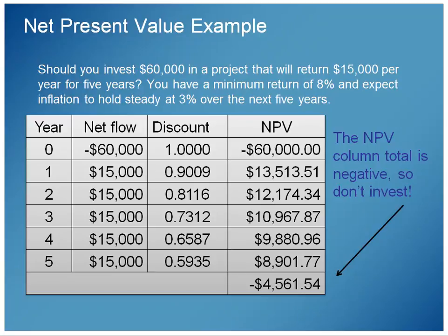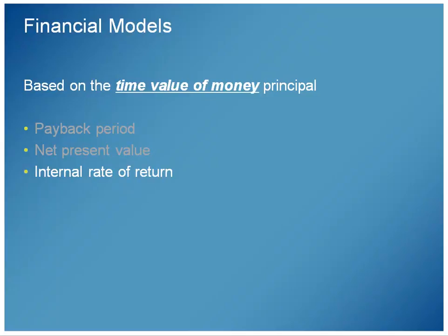I end up negative $4,000. So my net present value on this deal, this proposed deal, is negative. Therefore, it's not a good deal. It will not give me an 8% return on investment. I need to find another place to invest my money to be a good financial steward there.